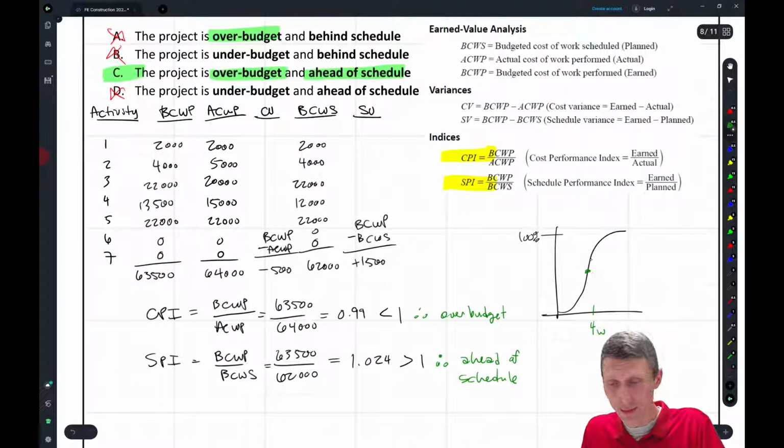And this is the budgeted cost of work performed, right? What we'd see here is the actual cost of work performed would be a little bit higher. So this is the actual cost of work performed. Right, actual cost of work performed. In this difference here, that's your cost variance.